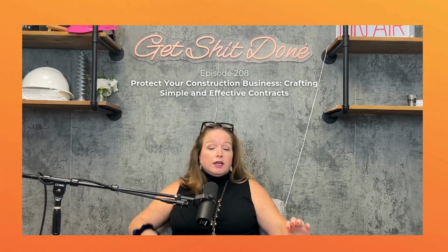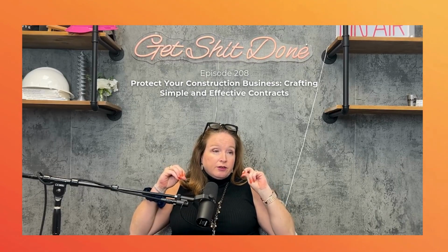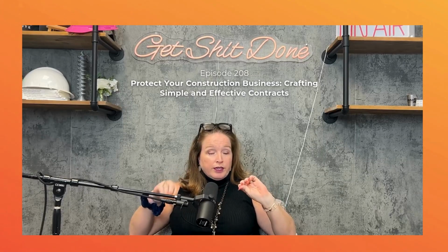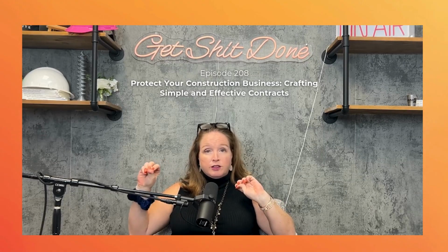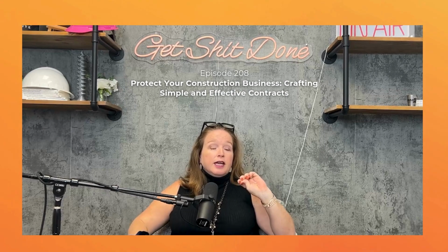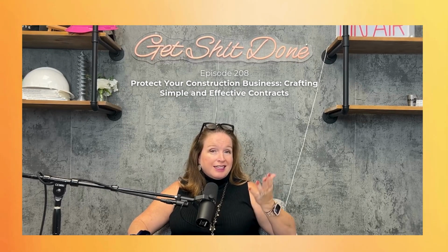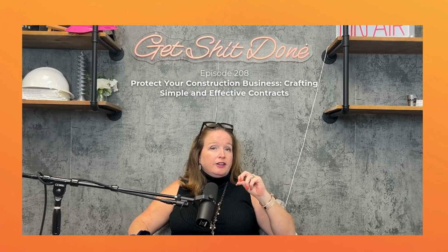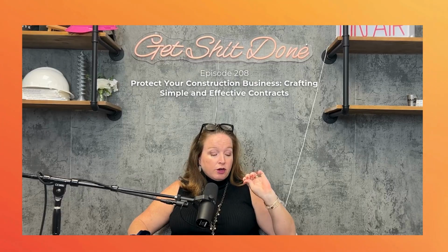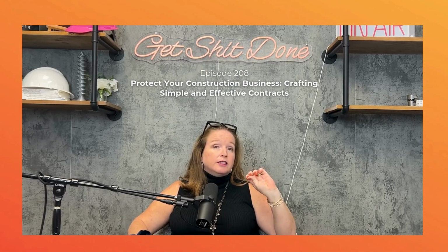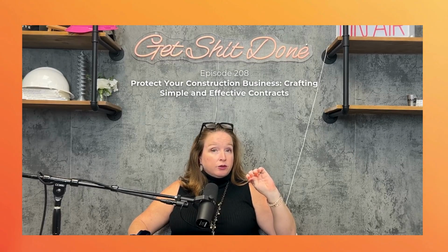Now, I'm going to break change orders down from commercial to residential because they're two completely different animals, right? In residential, you get to write your own contracts and you can say what a change order is. In commercial contracts and commercial subcontracts, you're given a contract that has a change order provision and you have very little room to negotiate what's in there. So let's start with commercial subcontracts or commercial project contracts that have change order provisions.